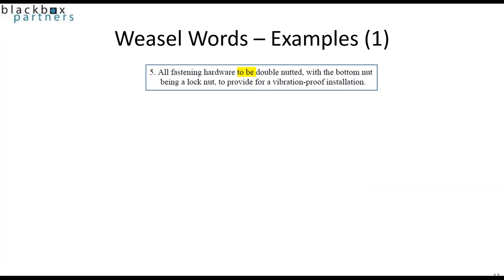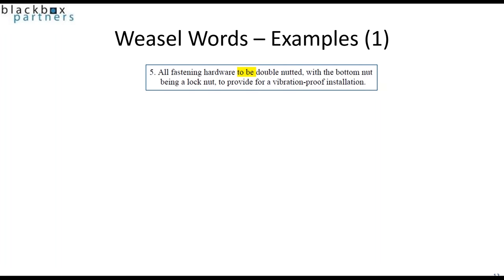An example of weasel words — and by the way, this is from an actual statement of work used on contract by one of the participants in one of Black Box's many writing statements of work classes. From the contract: 'All fastening hardware to be double nutted with bottom nut being a lock nut to provide for vibration proof installation.' This 'to be' phrasing is not clear about who will do the work, when it will be done, or by whom. Clarifying the language would look like: 'The vendor shall double nut all fastening hardware. The bottom nut on a double nutted item of hardware must be a lock nut to create a vibration proof installation.'